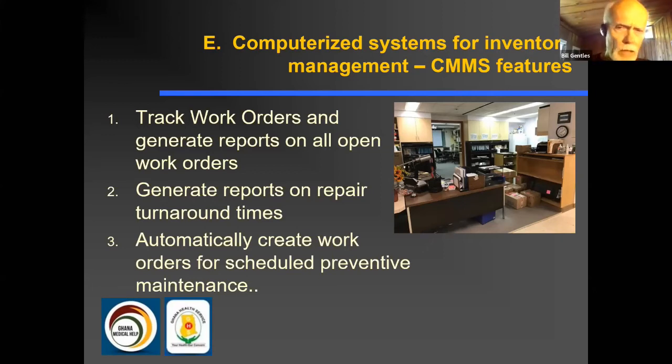So you've got two different brands of oxygen concentrator. With one, the spare parts you can get in a week, and the other one, it takes 6 months. Once you've got this kind of database, that you can quickly collect that kind of information across the whole country and make some procurement decisions based on things like availability of spare parts and how quickly you can get them.